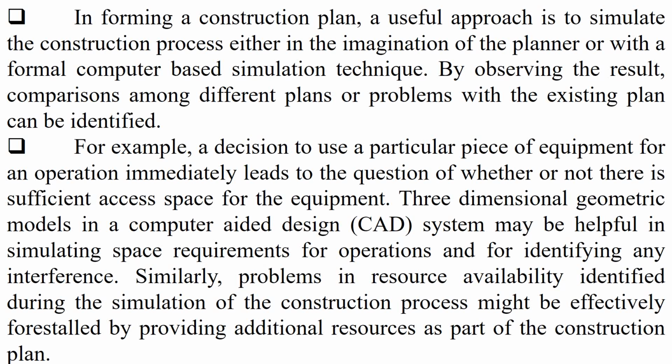For example, the decision to use a particular piece of equipment for an operation immediately leads to the question of whether or not there is sufficient access space for the equipment. 3D geometrical models in the computer design in the CAD system may be helpful in simulating space requirements for operation and for identifying any interference. Similarly, problems in resource availability identified during the simulation of the construction process might be effectively forestalled by providing additional resources as a part of the construction plan.